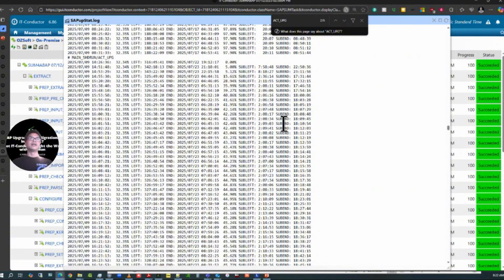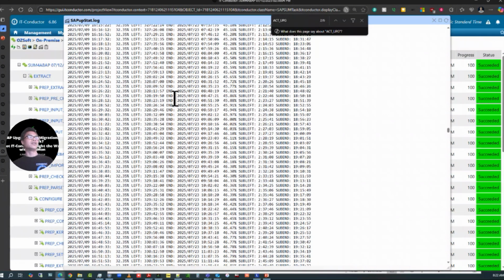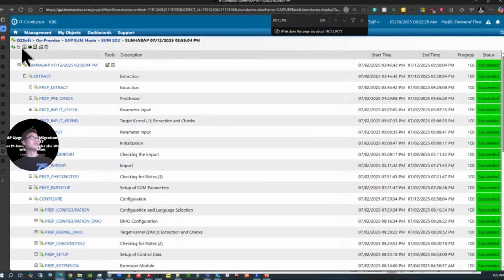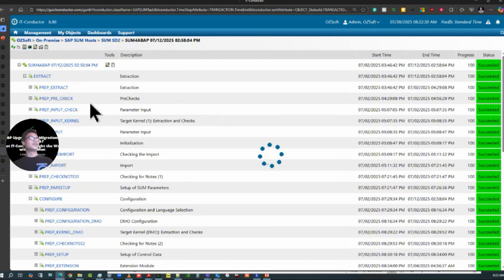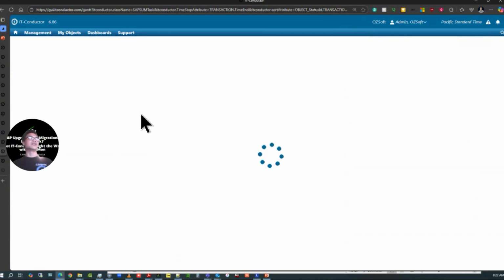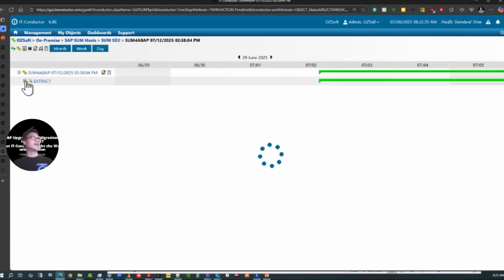So you do have it, you can give it to them, but your best guess is that if you're going the second time around, you have access to this. So I always run projects where I do the first one and I use the stats on that to optimize and analyze. When I run the second time, I have this in one of these tabs, and I say, hey, I know exactly how long this ran for, right? But not only that, I have the Gantt chart to show for it now. So if I'm in this, I can easily show how long something took, because I can just go here and say, Mr.